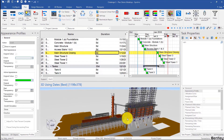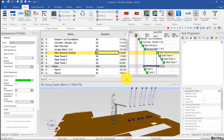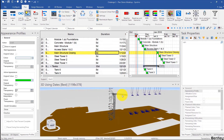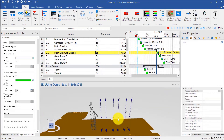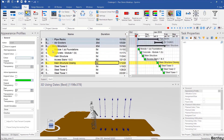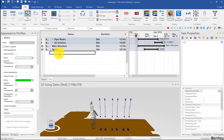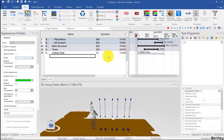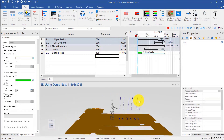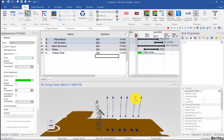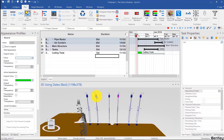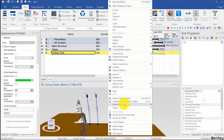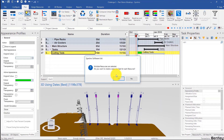Let's see what else is missing. We can go all the way back in the schedule and see what's left. We have this steel structure over here, this girder, and these cutting tools. So we can collapse tanks, collapse main structure, use cutting tools, make that a 10-day activity, and just click on one from each — however, I'm going to use them two by two. So I'll click one, two, three, and click on that over here. Right-click, create tasks under selected task. Yes.